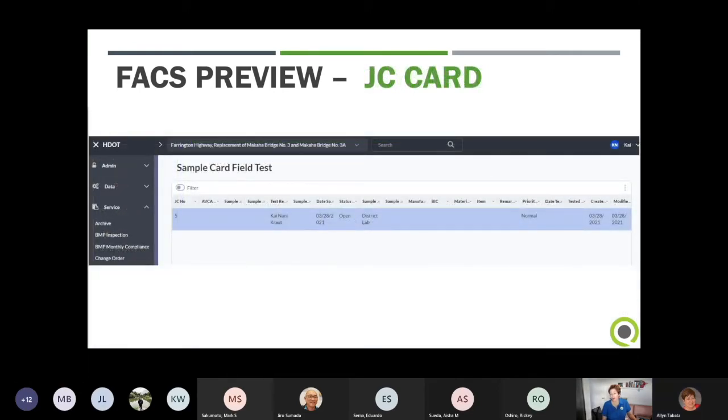So yeah, Bill, I think when you do the onboarding, and Jennifer, are you guys using Headlight at all right now? No, we're just still using fax. I think on the H1 viaduct we are going to use Headlight though. Right. So when you're using fax right now, are you having issues with the quantities and the payout? Not if everything matches, but on a paving night, if you're paying by square foot, and the contractor's values are slightly different from the inspector's values, to come to that agreement, if we're going strictly on what they're entering into fax, there are some issues there.